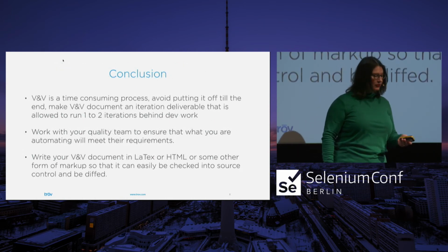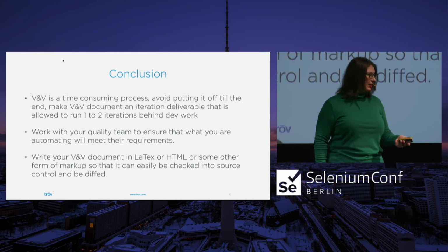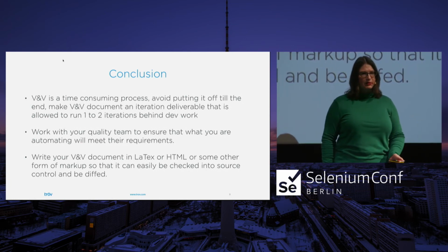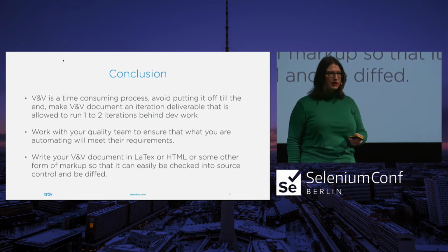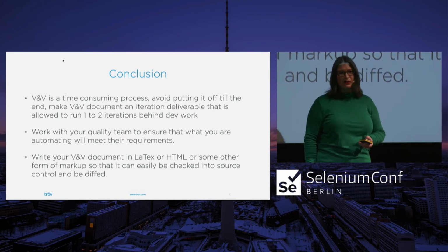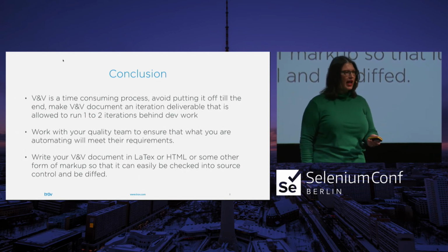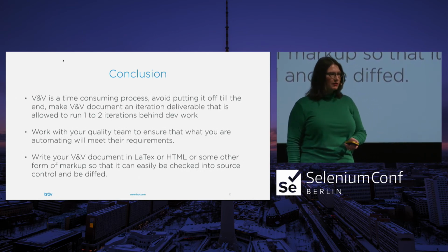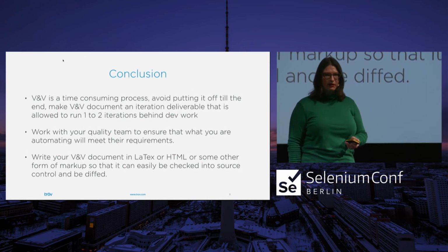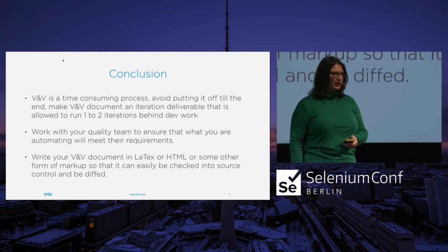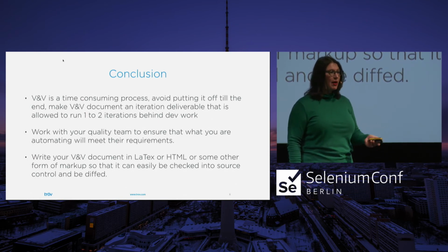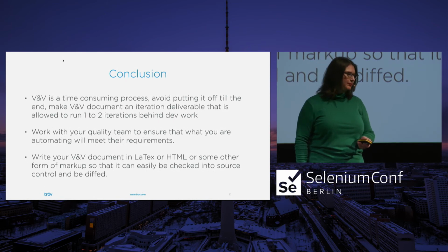So I've gotten to my conclusion, and I still have time left. But it's a huge time-consuming process. I cannot underscore how long it took us to write this document. We started writing this document in November. We finished it on the last day of April. It was over 100 pages long in the end. There were hundreds of iterations. We spent the vast majority of our time trying to write this document. In fact, the software was finished for a month, and that's how far we'd gotten behind.